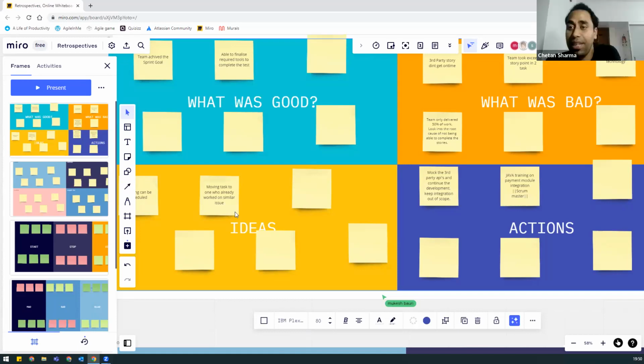A weak answer, right? Scrum meeting. Which Scrum meeting am I asking? Yeah, planning. If you're doing it in the planning, then, yeah, sorry, that will be during refinement, when we're refining the stories. During refinement, when we are estimating, at that time we should identify these gaps. Now we know we have a sprint planning after a week. We are doing a sprint refinement a week early or 2 weeks early, right? Now we know the gap.